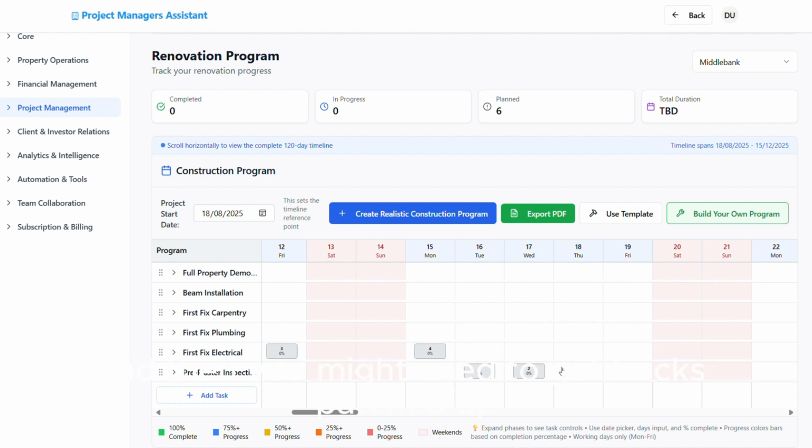and then you might need to get bricks patched up where holes are in walls. There might be something that's not quite right by the electrician. There might be something that's not quite right with the plumber. The joinery might not be quite right. This is when you check everything must be in place, ready for the plastering that's going to go down next.